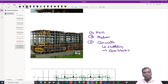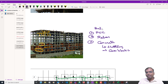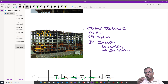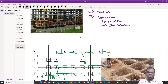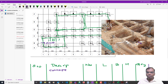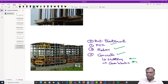For this particular project, I am going to need a few things: PCC, rebar, and concrete. For doing the concrete effectively, I need shuttering and cover blocks. If you look at the specification and it says anti-termite treatment, then probably that should be done before doing the PCC. But as of now, I am just going to go straight for the concrete chapter - PCC, rebar, and the concrete, which involves shuttering and cover blocks.